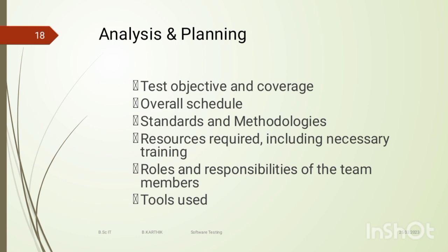Activities include preparation of the plan and strategy document for various types of testing, test tool selection, test effort estimation, resource planning, determining roles and responsibilities, and training requirements. The deliverables of test planning are the test plan and effort estimation. Test plan is like the type of strategy to be followed, and effort estimation is like a documentation.